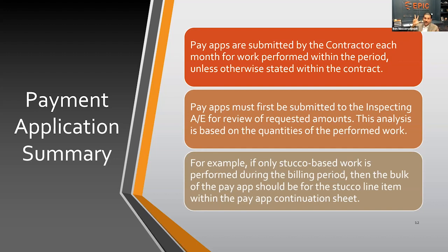So you have at least these 3 items, and they'll all be broken down, whether it be square foot or linear foot, whatever is applicable. But you still can lump sum the value for the waterproofing and lump sum the value for the new diamond bright, because you know it's only going to be within the pool, within that confined body of water without any water in it. But the true unknowns, the items that can increase, go up and down, you want to itemize those things out.